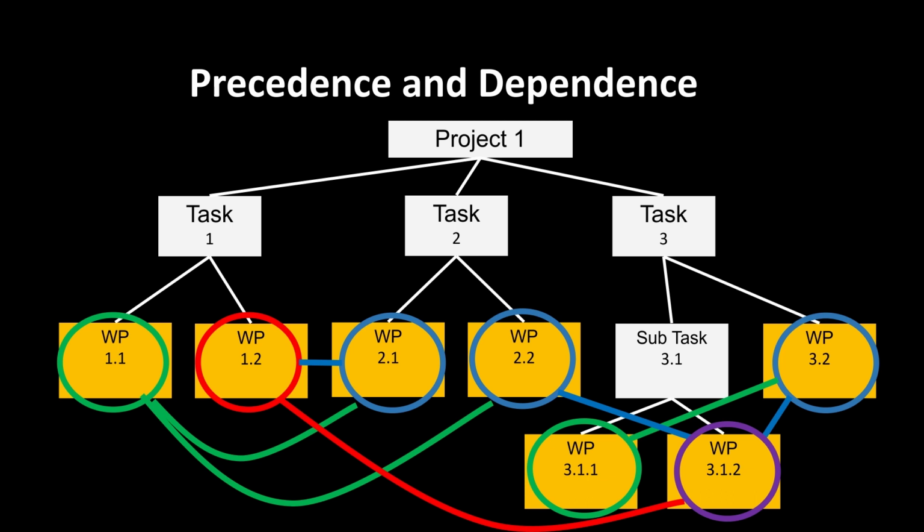What I would suggest is if you're doing it in the real world, you can use post-it notes for each of your individual tasks here. And I've certainly done this in the real world and it's very effective. By using post-it notes, you can pop them all up on a wall or on a table and you can lay them out, and then you can pick them up and move them into a logical order that makes sense following your precedence and dependence requirements. That way, you're not moving things around on screen constantly and trying to make these kind of connections, which is time consuming and it can get really confusing. Good old post-it notes, if in doubt, go back to the old ways.